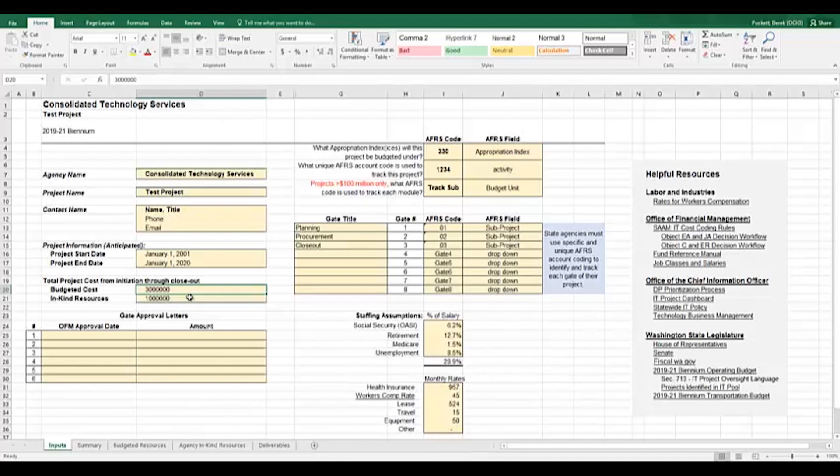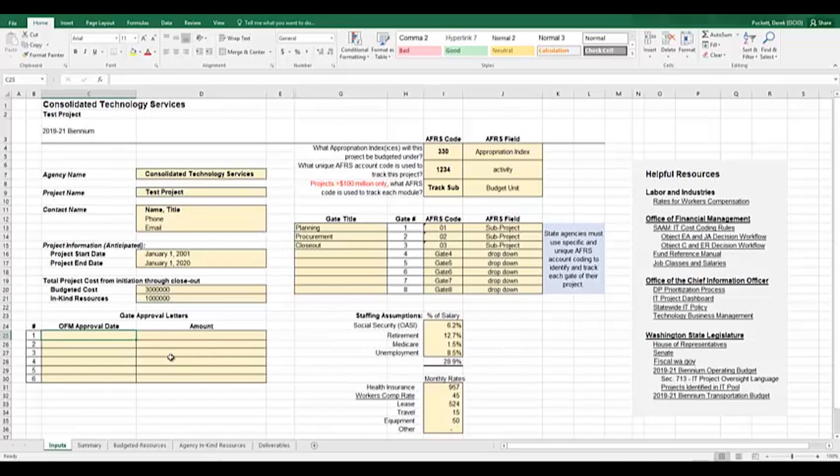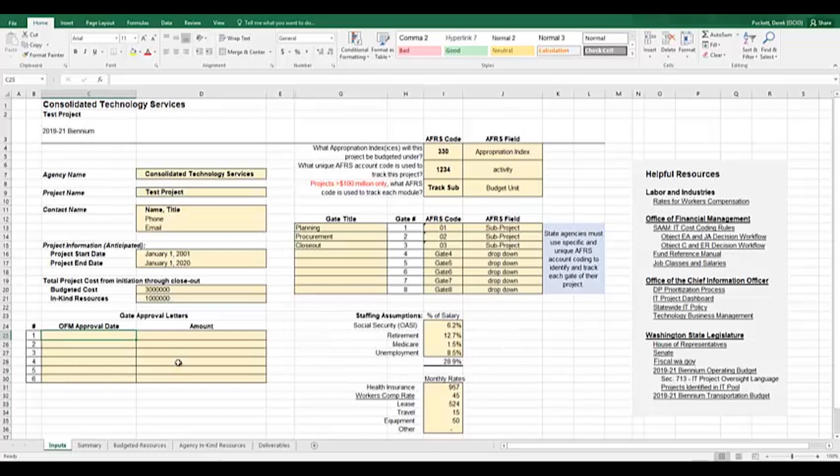The last section on the left-hand side of the screen is a place to input the various gate approval dates and amounts. This section begins in cell C25. As you receive gate approvals, this section will be updated to include the date of approval and the dollar amount approved. The budget bill requires projects to use distinct account coding to track costs for the project at large and for each gate of the project.